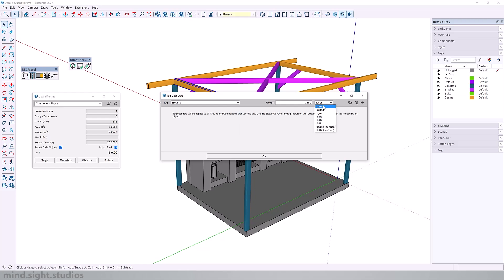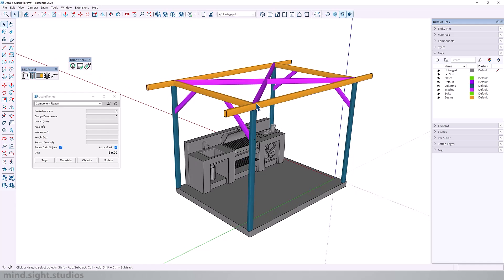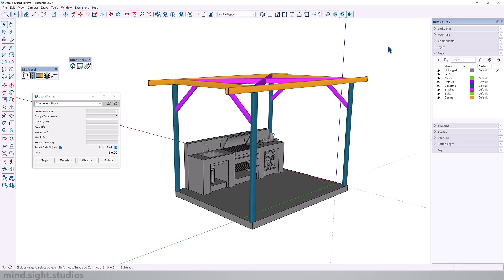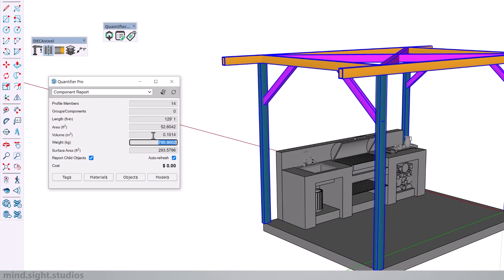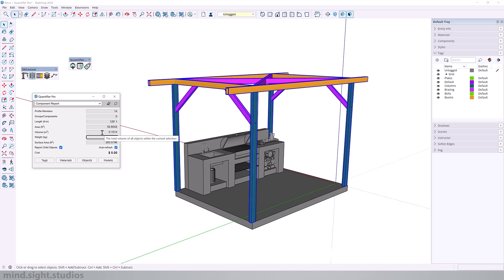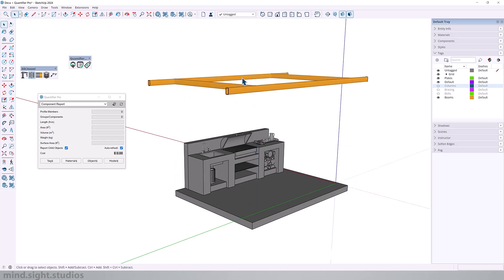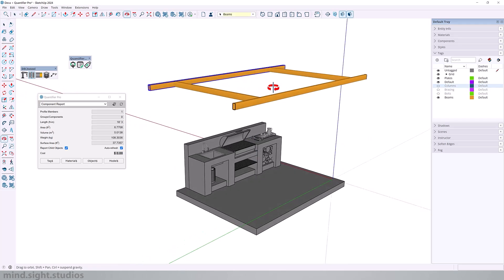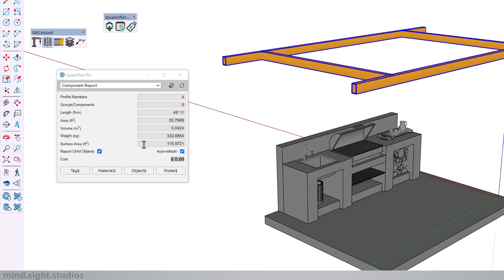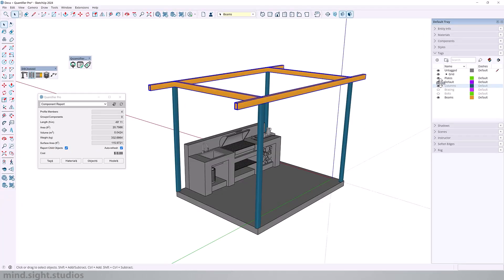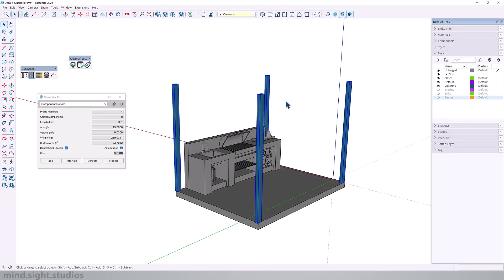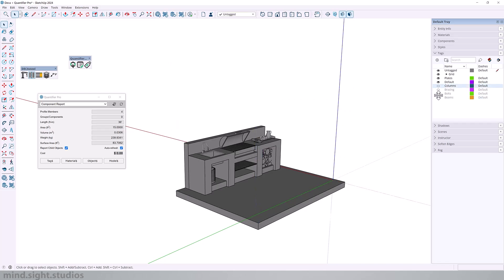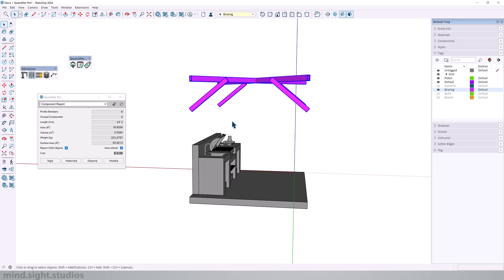So now that we got the weight for each structural member, we can easily get the weight of the entire structure. If I select all my steel elements, you can see that it calculates all those values for me. This information is very important when you're making structural decisions. And it's even better that you can get all of these values with Quantifier Pro. For example, if I wanted, I could single out just the beams by turning out all my other components and select all my beams. I can get the total length, total area, volume, as well as the weight. Similarly, with just the columns and even the bracing. I select all my bracing. I get all this information readily available for me.